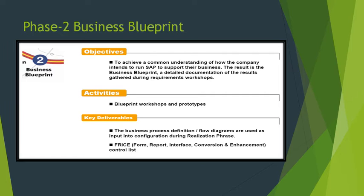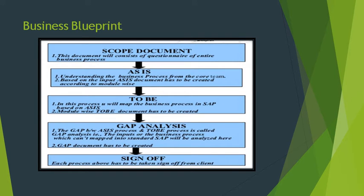Questions that come up include, for example, what information do you capture on a purchase order, and what information is required to complete a purchase order. As we proceed with the business blueprint, we prepare a scope document which consists of questionnaires related to the business processes. We define the as-is — what is the current business scenario — then define the to-be, which is what the client requires. We then do a gap analysis: if standard SAP is not providing something, we analyze and propose how to implement it. Finally, we again take sign-off from the client on the business blueprint.